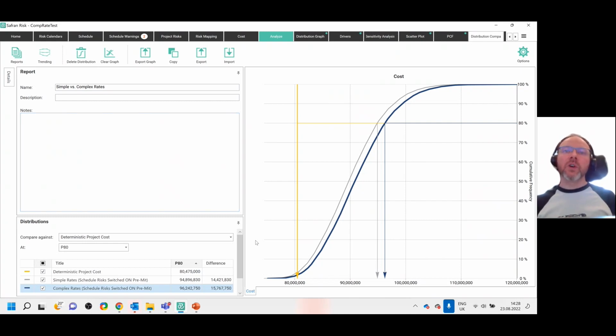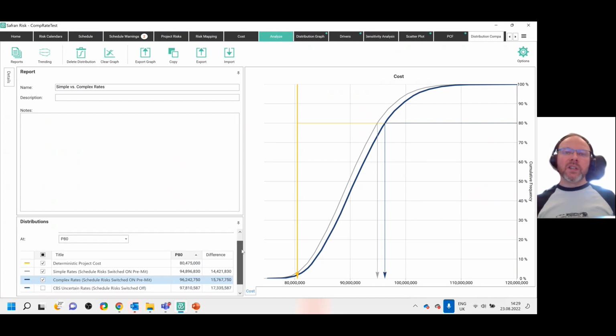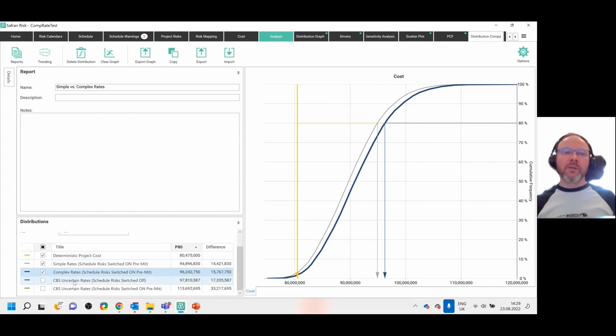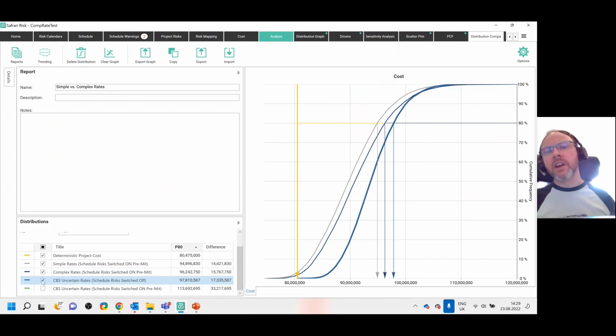There are other things going on. The costs themselves, like the base price per unit of a widget, are maybe uncertain, and then you might have uncertainty on the scope: how many of the widgets are you going to need, and how much does each individual widget cost? There's uncertainty there. So when you start factoring in those extra things, we've got a few more here. If I add in this alternative method that we're going to look at in the next video, this curve is a different shape. It's no longer perfectly parallel, so it's clearly doing something different.